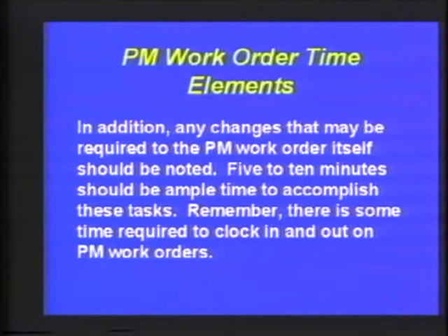And once that is completed, as I said previously, the PM person will be clocking in and out on that wrench time. And then we can compare the aggregate time estimated to the aggregate time actually on the job. Part of the feedback, if you remember, from the PM people is to actually review the steps, make sure that the steps are in proper sequence. Are there any steps that are not required? Are some steps omitted? We need to give some time to the PM person to go through that analysis, and at least that has to be considered when we initially start up the PM program.